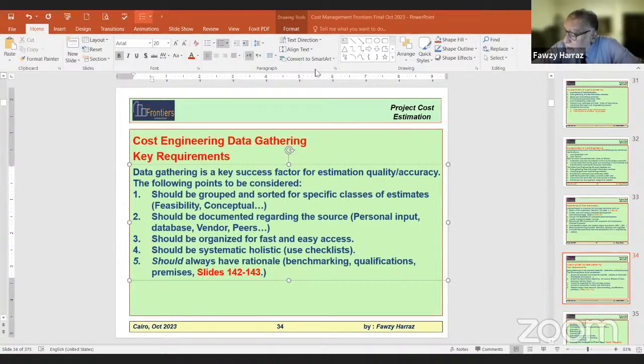Unfortunately, the bid committee had to accept the lowest bid. Some time ago, my colleagues, we used to have a rule to disqualify for low price, actually, not the lowest bid. If you assess that this price is too low, then you should suspect and expect problems behind that. Unfortunately, public sector and government-managed companies do not have this flexibility. They have to abide by the blind rule, choose the lowest bid.